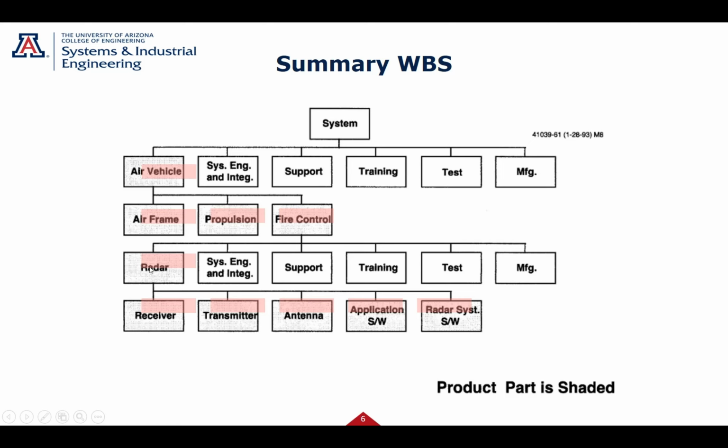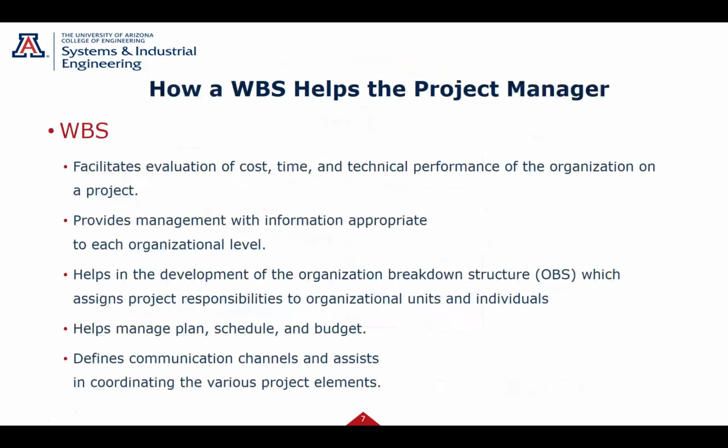Now I take the radar and I break the radar down into receiver, transmitter, antenna, software, and so forth. So I keep breaking this down until I feel comfortable that I understand all the pieces I need to do on this project. Again, we'll go through a couple examples and you'll see how this works.